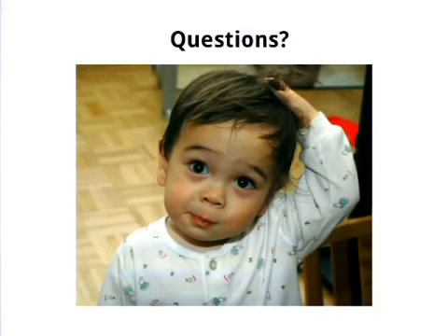Okay, but if you're working through your iterations at the end of your backlog and you get to the end of the final iteration and still some features. But it's never a surprise. So you're never going to get to the last week and go, oh my gosh, we're not going to finish. It's so clear and everything's estimated, so you're much more ahead of it than that. So halfway through you can get a really good idea of, are we going to be able to finish everything that's in there? If we're not, what are the things you can live without?